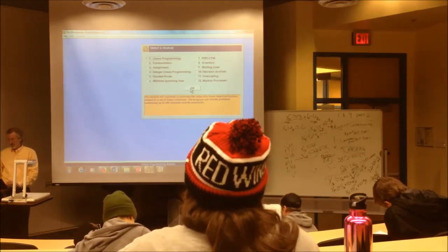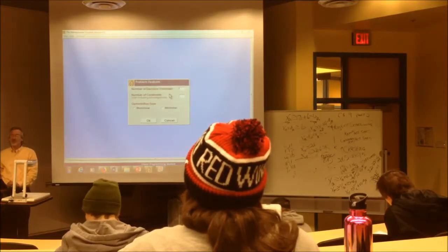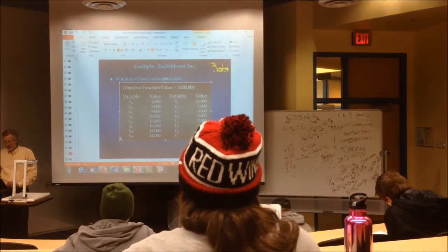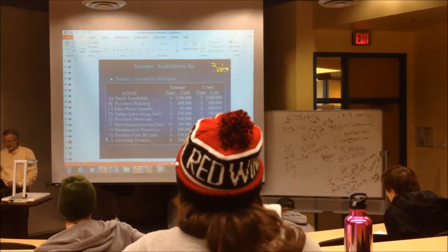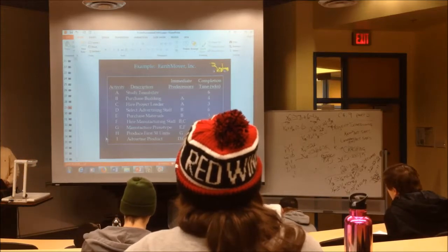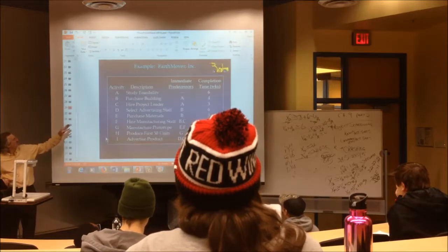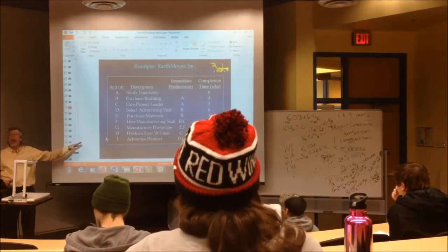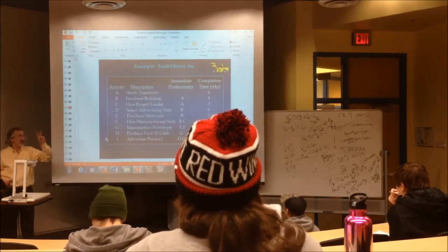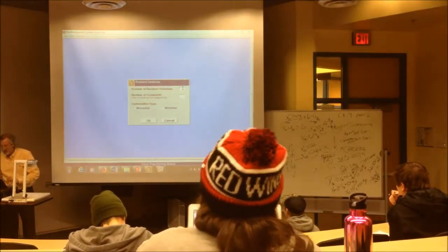Okay. Now, let's pretend this is new. It's going to say how many decision variables. You're just going to say how many variables. Let me count. 1, 2, 3, 4, 5, 6, 7, 8. Is that 9 activities? So how many variables? 18. I heard it. 2 variables for every activity. Remember? 18. You get that? You put in 18.